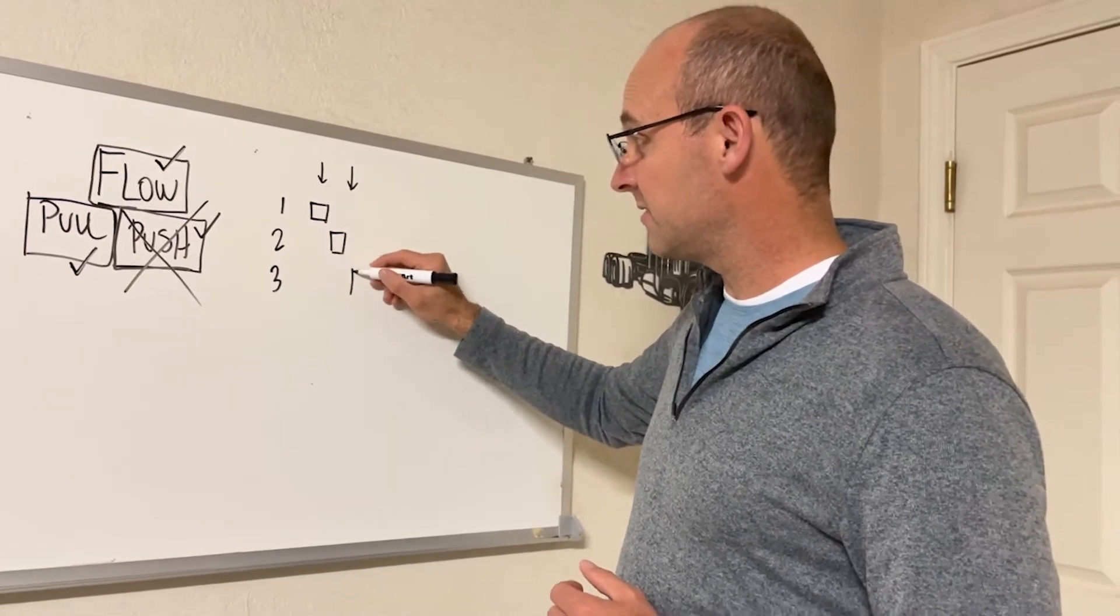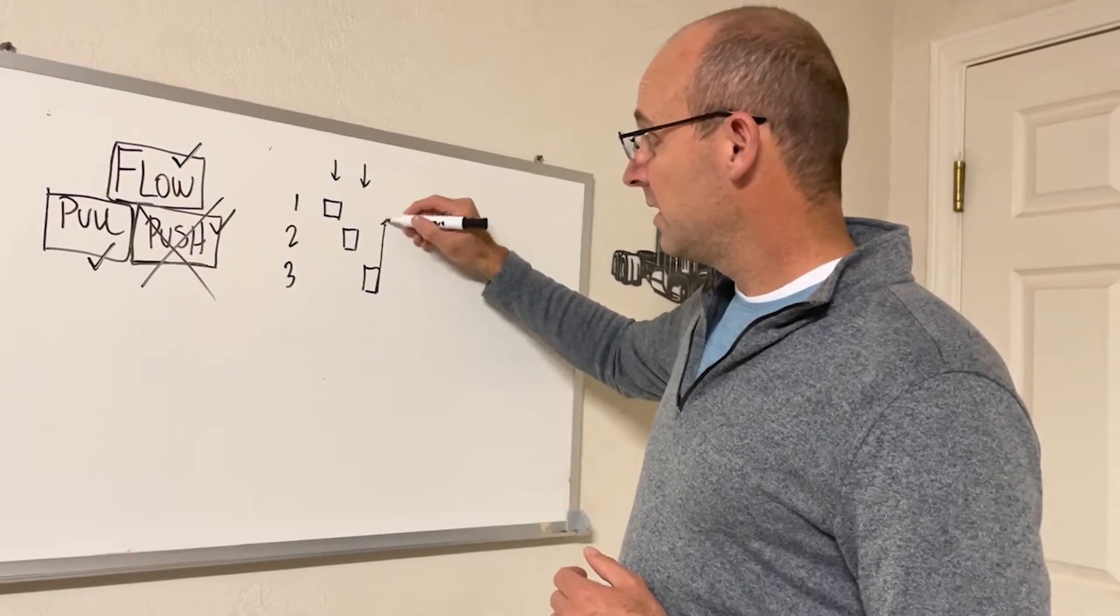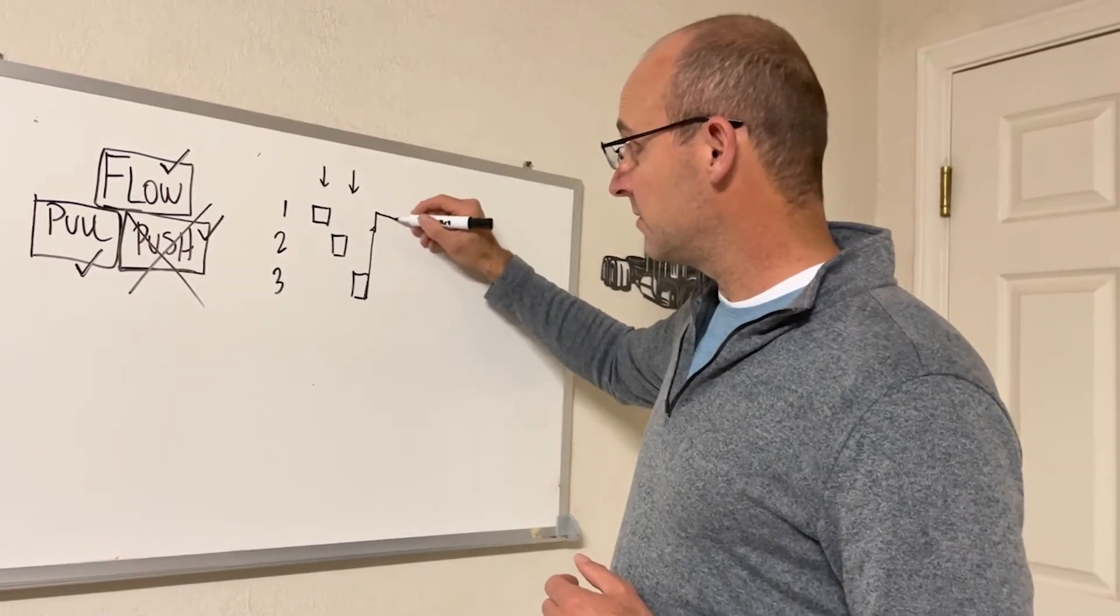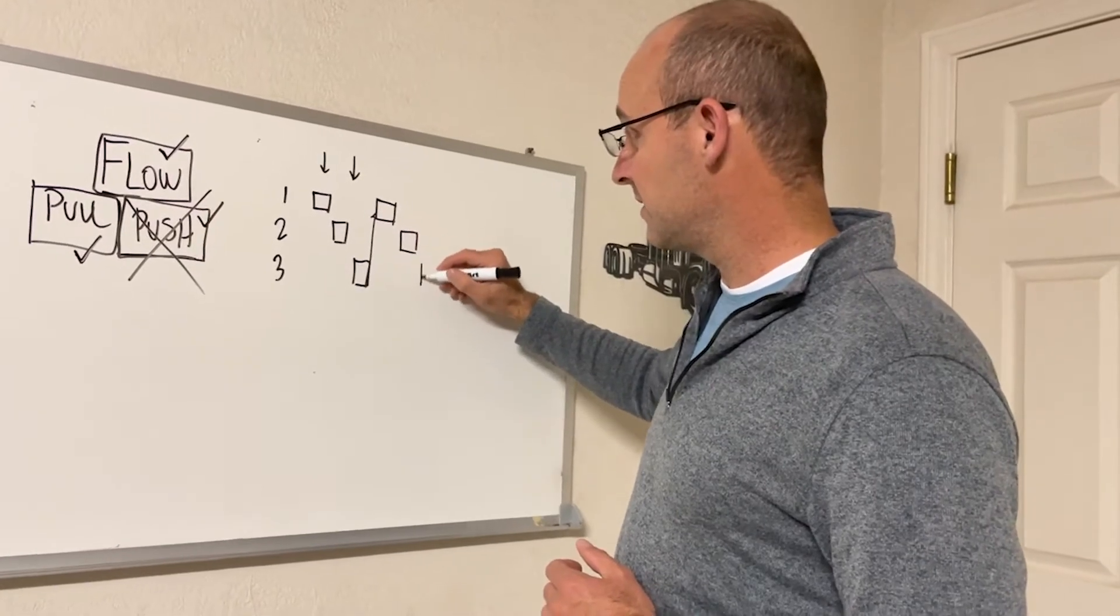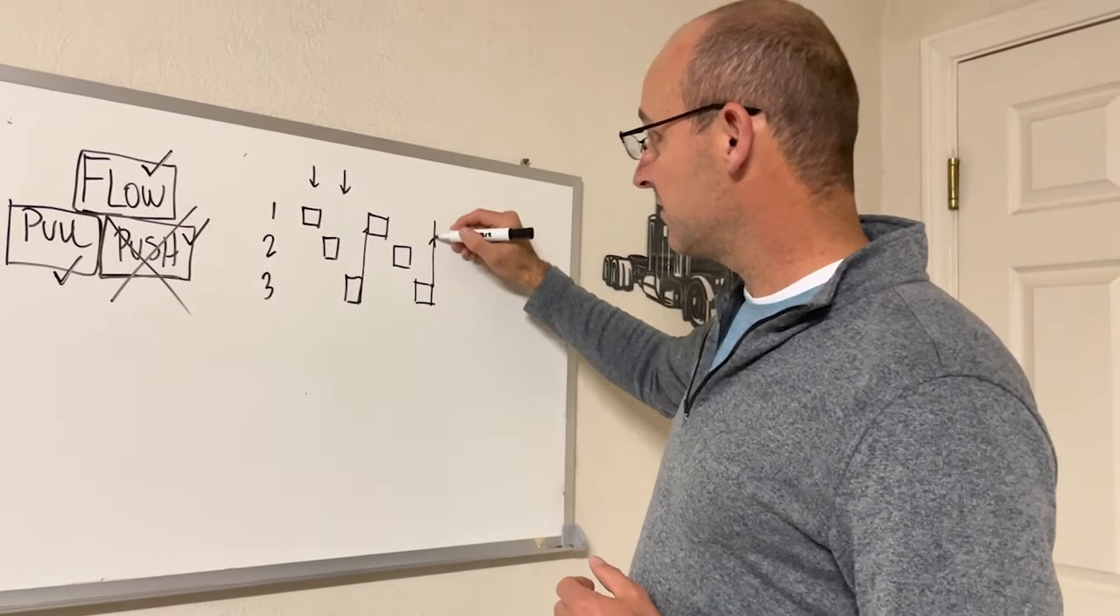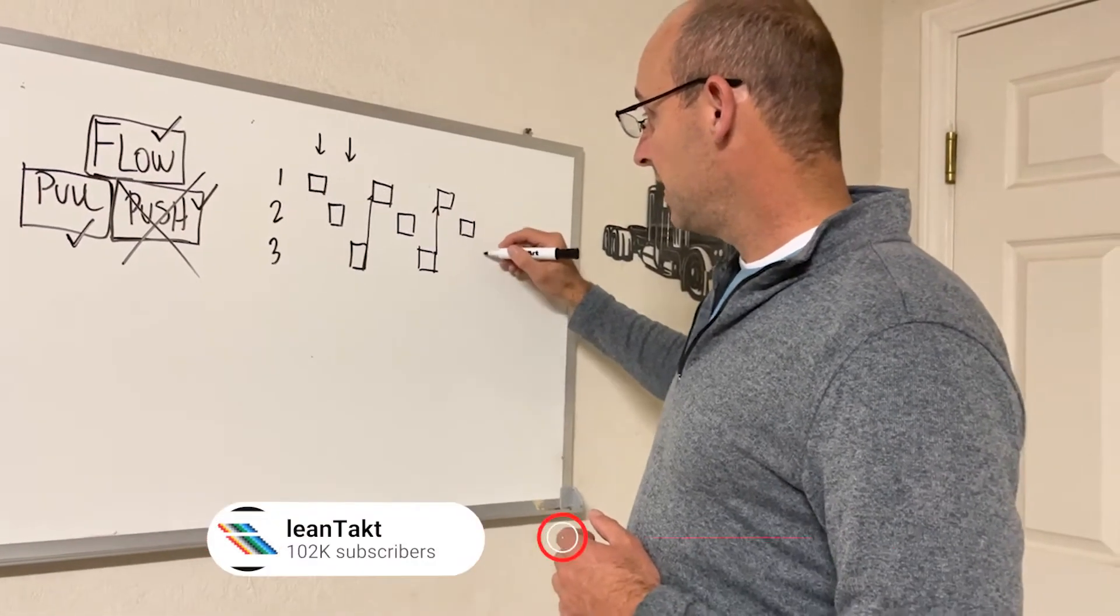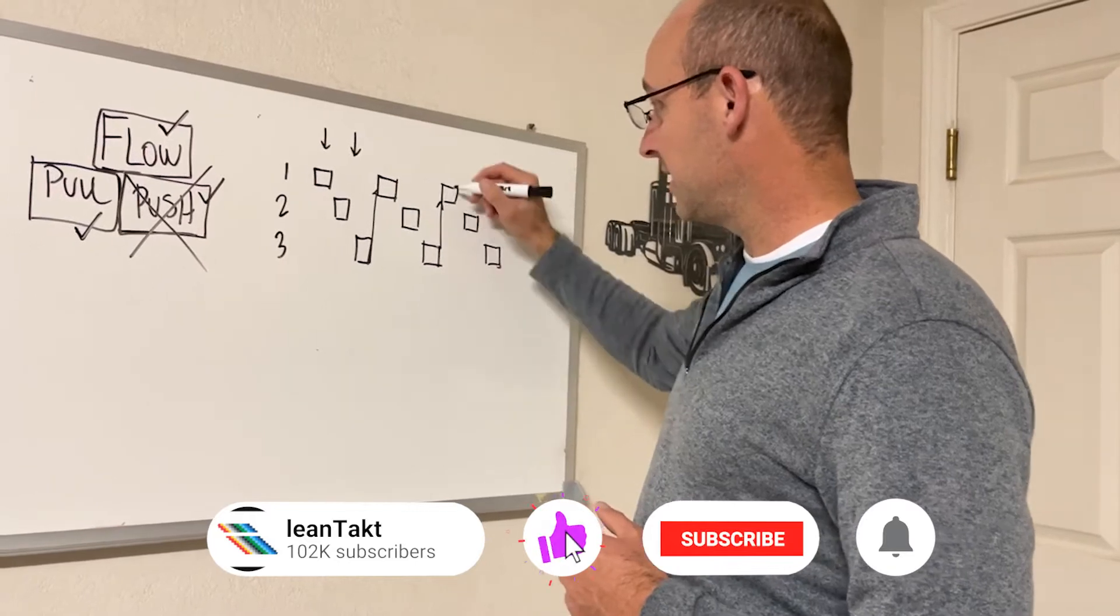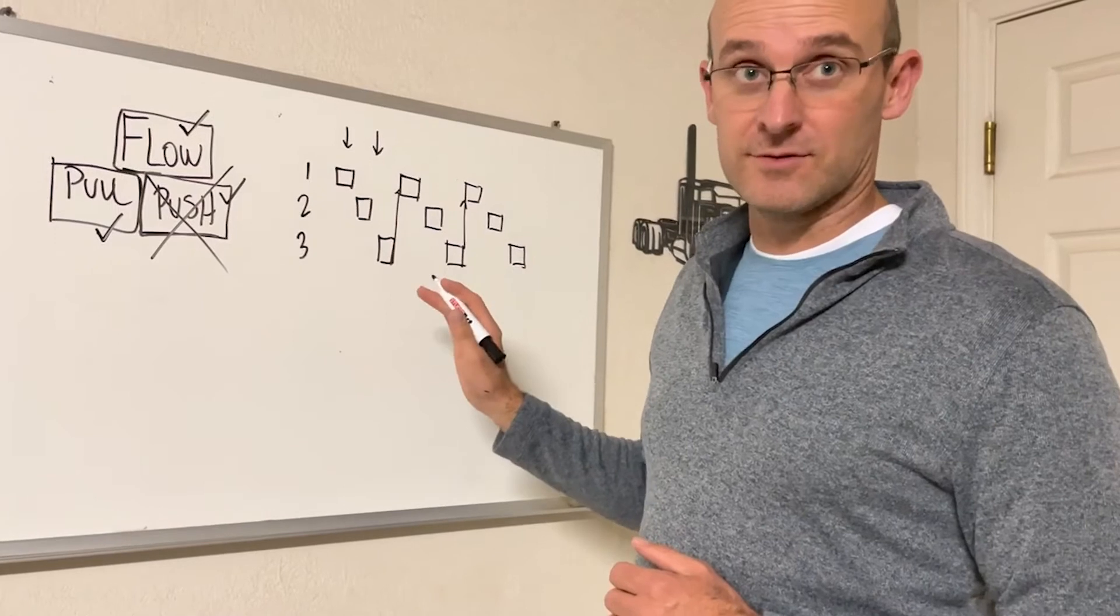One activity, and then they would go to area two for that activity, and area three. And then they would have to go, that same crew, and do back to area one and do a second activity in the sequence, and then down to three. And then that crew when it was available went to do the third activity, and then they did that third activity in area one, two, and three. So this doesn't look like it flows, but it flows because we have crew flow.